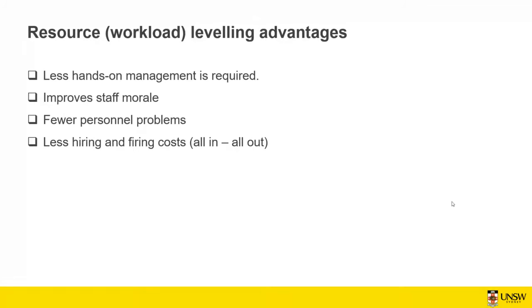It also improves staff morale because they don't need to rush to finish a thing, and they know that the work they're going to do each day is going to be more or less the same. So there's not going to be some weeks with a lot of work and some weeks with a shorter amount of work. And fewer personnel problems, as I mentioned. When you want to finish the task in a short duration, there's going to be a lot of stress on the staff, and there are also less hiring and firing costs.